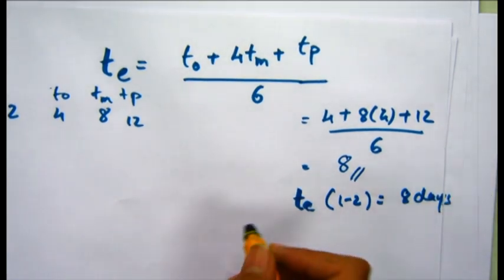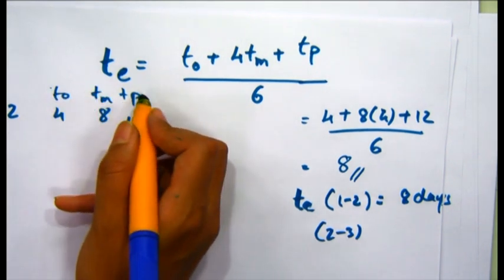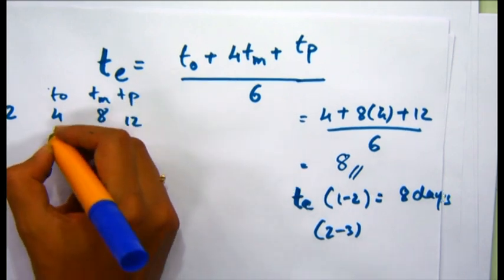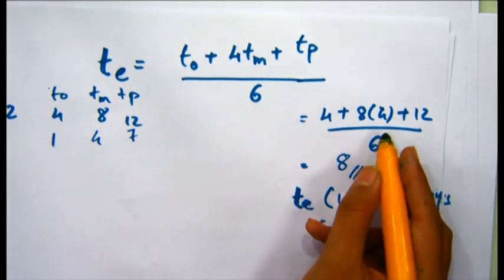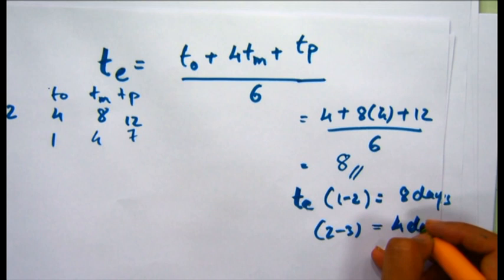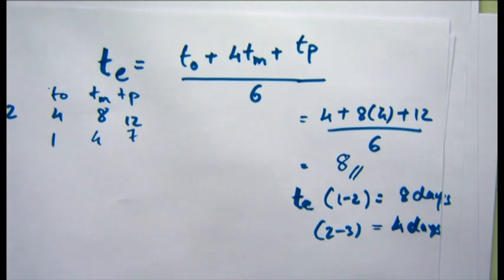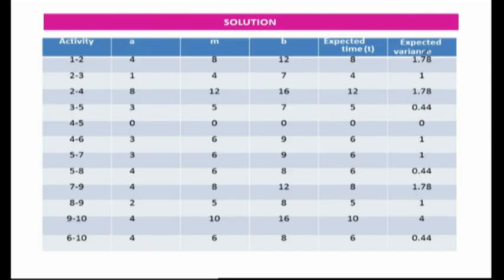Similarly, for activity (2,3) with optimistic time 1, most likely time 4, and pessimistic time 7, putting these values in the formula gives an estimated time of 4 days. We calculate estimated times for all activities in the same way, as shown in the table. The 5th column of the table shows the expected time t_e for each activity from (1,2) through (6,10).